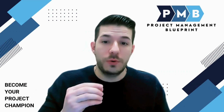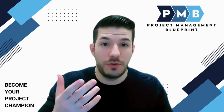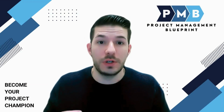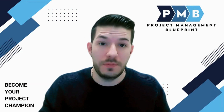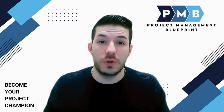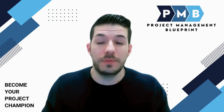So what I would say to Mel and for anyone else who has a similar question or has thought about implementing this is that the time to do it is, again, in your contractor services agreement. You can include a clause for either just a delay penalty, or you can include a second clause for the performance bonus. So you have both the carrot and the stick in one.